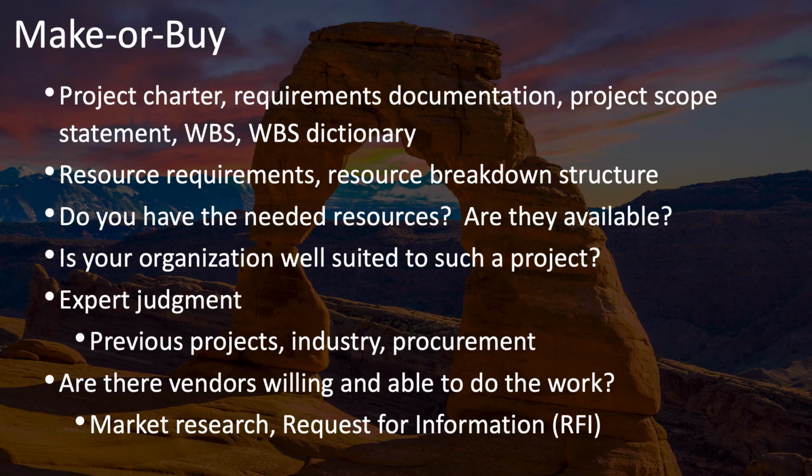Then you'll need to ask yourself whether or not there are vendors out there that are willing and able to do this work. In order to determine this, you'll need to do some market research, and you may even need to issue a request for information to find out if there are vendors out there that have the capacity and capability that you need, and if they're willing to do it.